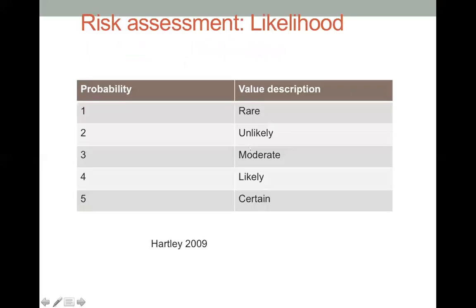All right, this is what we mean by the rating scale. You can rate it the other way around, like 5 is the lowest and 1 is the highest. But normally we say 1 is the lowest, 5 being the highest. From a likelihood perspective, if we rate an event as 1, that means it is quite rare, very unlikely. As mentioned before, if an event is very likely or certain, then we say it is 5.